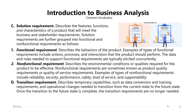The last type is the transition requirement, which describes temporary capabilities such as data conversion and training requirements and operational changes needed to transition from the current state to the future state. Once the transition to the future state is complete, the transition requirements are no longer needed. Whatever you need to move from the current state (as-is state) to the future state (to-be state) is a transition requirement, and once the transition is completed and successfully implemented, these requirements are no longer valid.